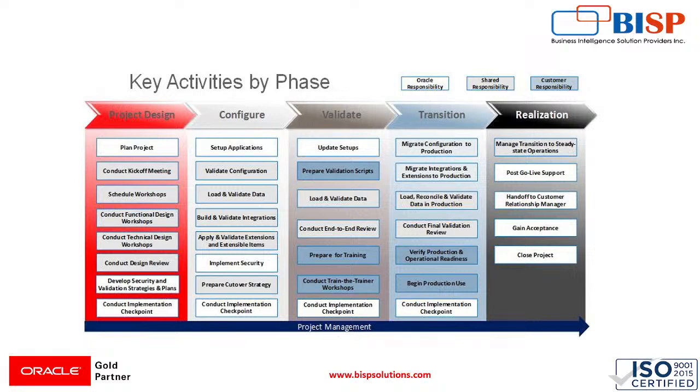Then we have to validate, then update all the setups that we have given. Then we have to prepare different case scenarios and different validation test scripts. Then we have to load data. If we have conducted some data, then we have to upload the whole data and see whether it is working smoothly or not. Then we also have to set up the end-to-end review with the client, and then start the training as well. Then comes the transition phase.